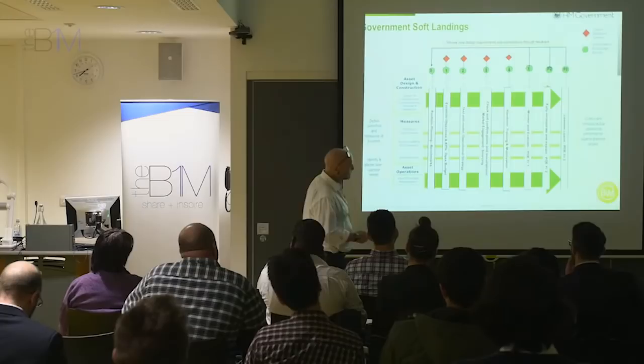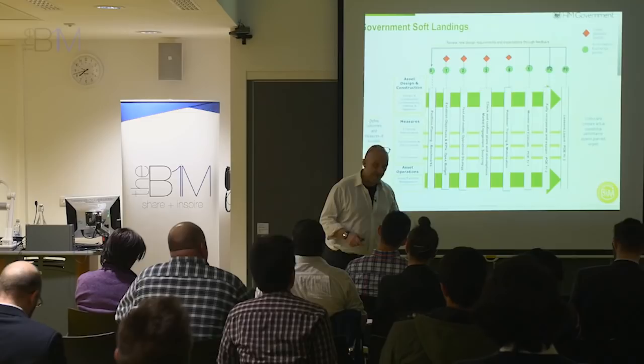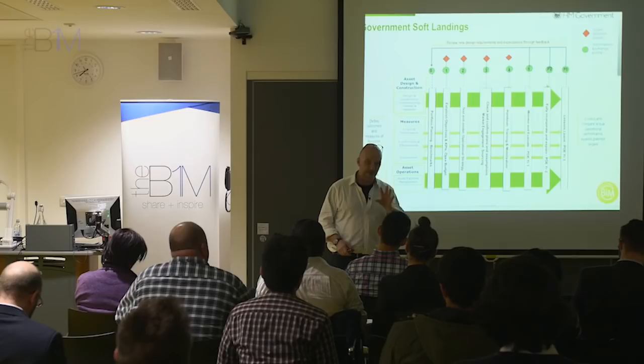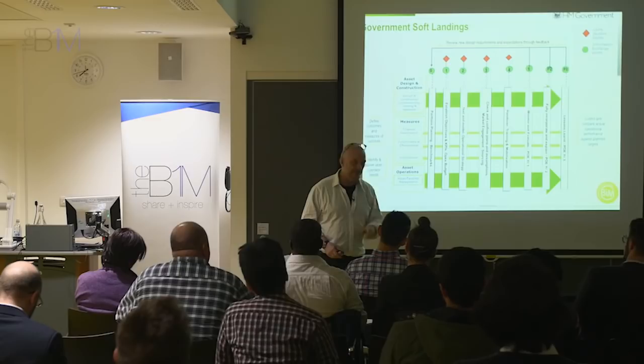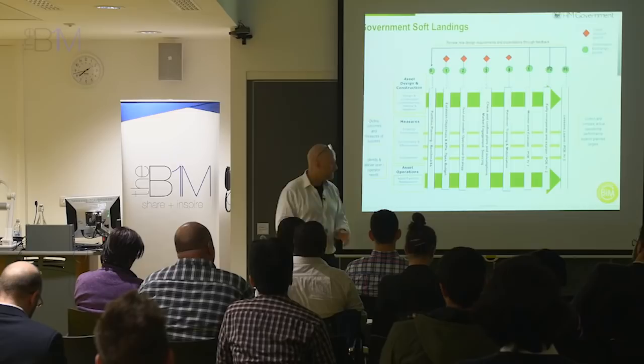And of course, we're moving into something called POE, which is post-occupancy evaluation. Try getting your project team now to go back to a building a year after it was finished and evaluate how it's working. Try and get them to do it after 2 years and 3 years, because this is what this is requiring, because government wants the data so that they can start to benchmark projects and understand how their buildings, their estate, is performing. So that feeds back into this.